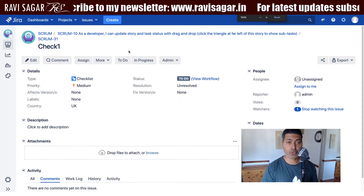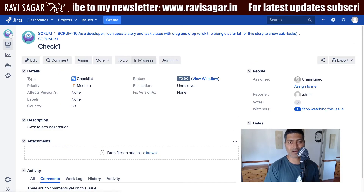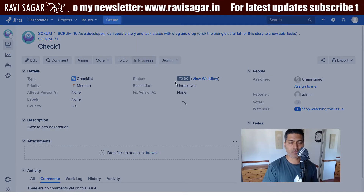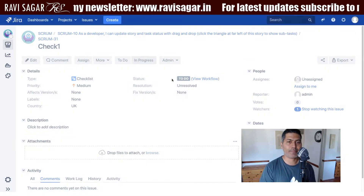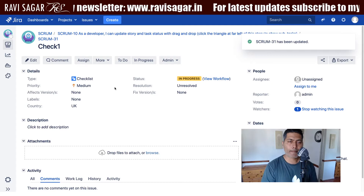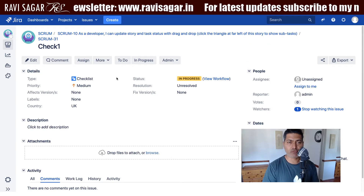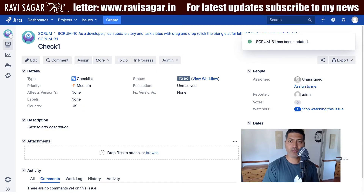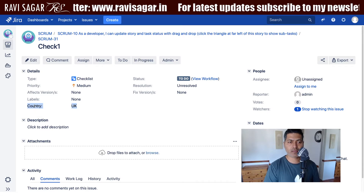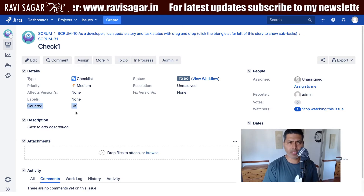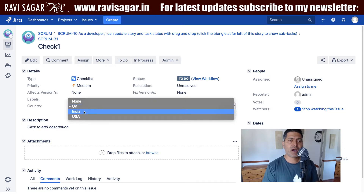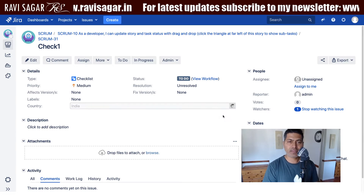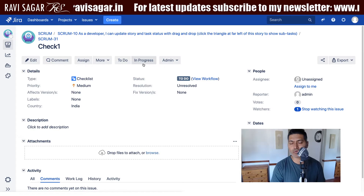Right now, users with the right permission can click on the In Progress button and do this transition, making the status of the issue In Progress. I want to have a condition in place where I check based on a single select list — in this case called Country, which is a custom field — and only when the value is India should this transition appear.